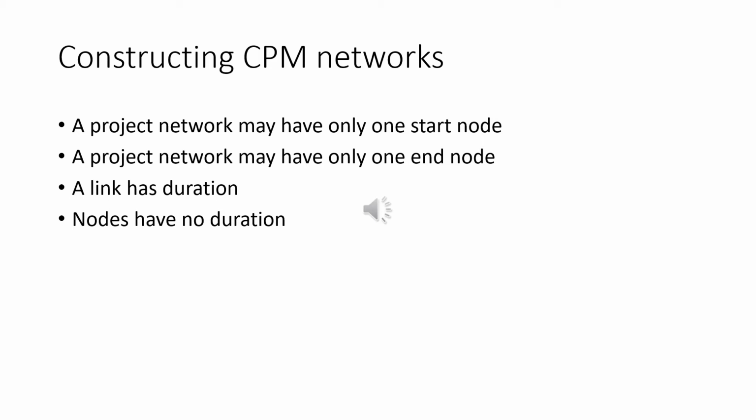Nodes in between, or intermediate nodes, represent two simultaneous events: the event of all activities leading into a node having been completed, and the event of all activities leading out of that node being in a position to be started.